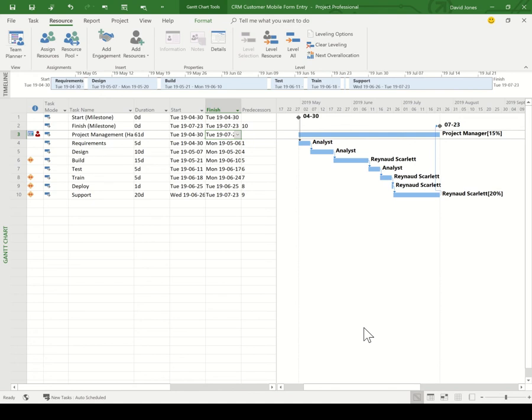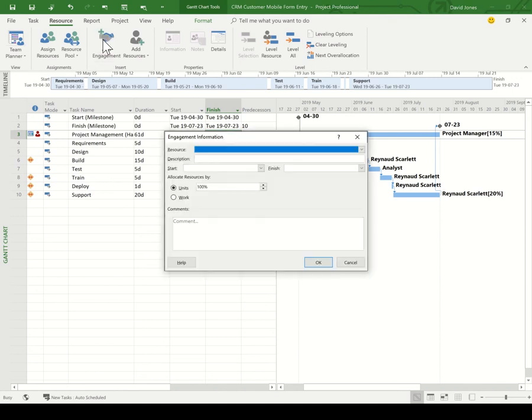In some cases, the resource may need approval, in which case I would add an engagement. This kicks off an approval process with the resource's manager.